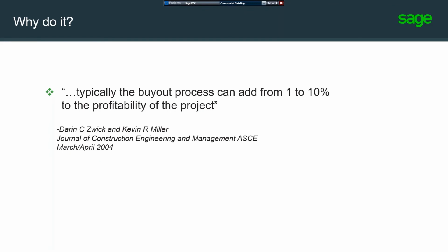So why do it? Some research that I was reading says we can add from 1 to 10% of the profitability of the project by doing a successful buyout process. Now, this does not mean that we're advocating shopping bids and things like that. That's a whole different deal. But we can increase our profitability of the project with a successful buyout process.